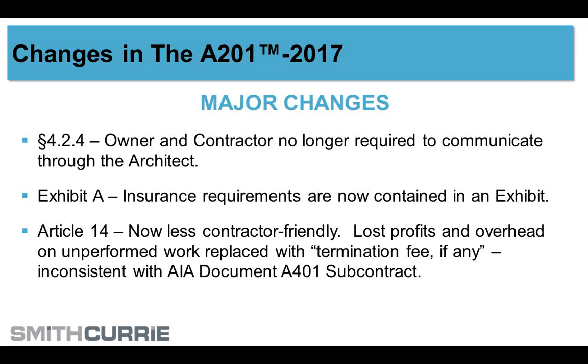So that's something you really need to look at, and I don't say this just because of where we are today, but even as a construction lawyer who I think understands construction insurance more than most lawyers, anytime I look at a contract, I say you also need to get your insurance agent to look at this to make sure you have what the contract requires, and if you don't, to figure out what it would cost you to supplement your coverage so you can build that into your price. You're not expecting to have to provide insurance at your own expense, I wouldn't think.